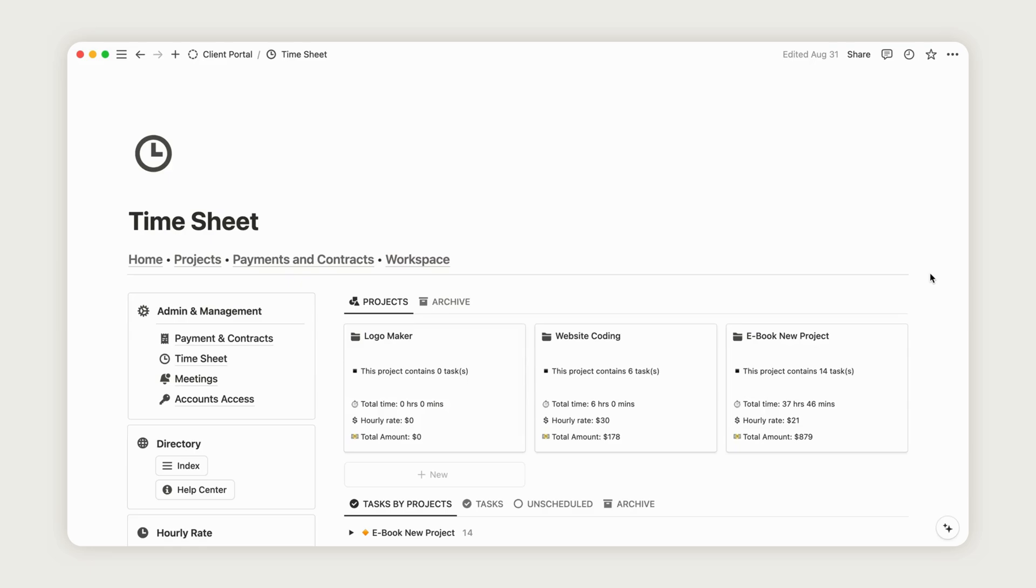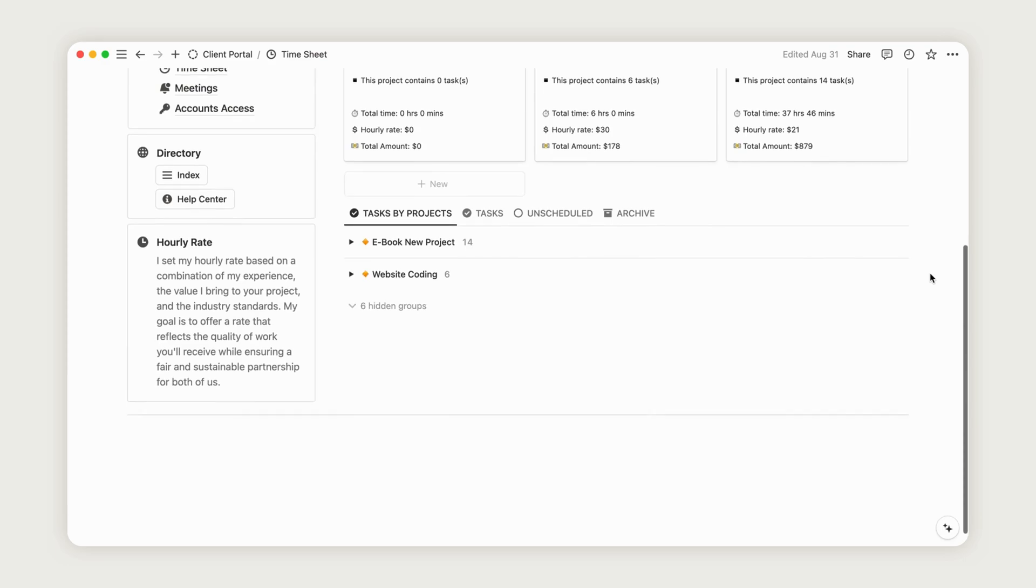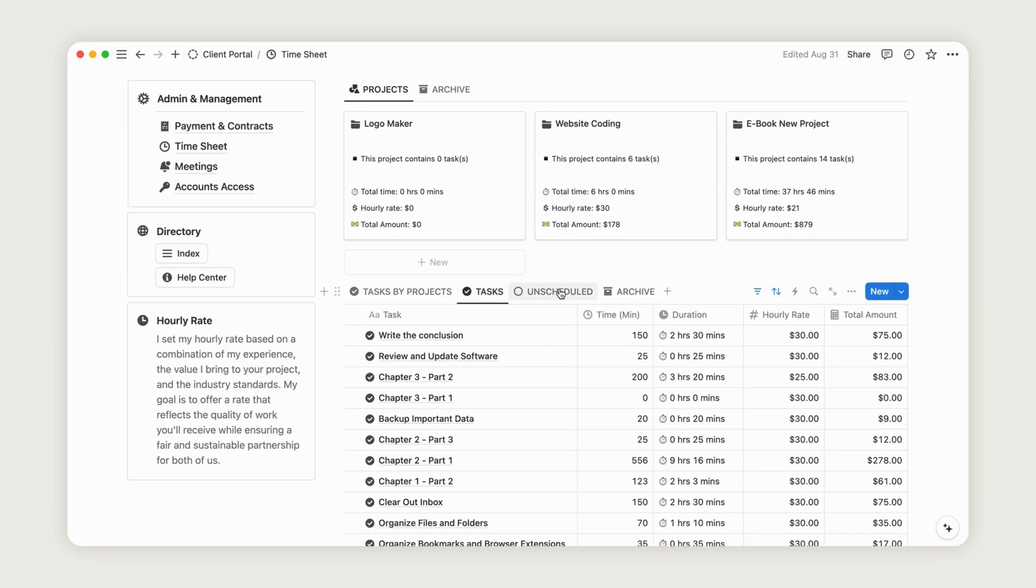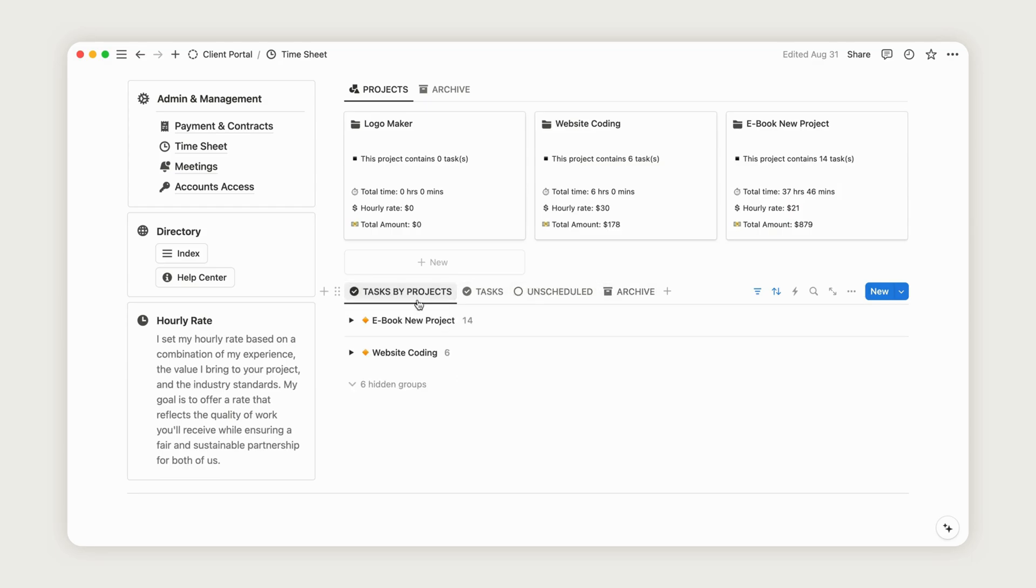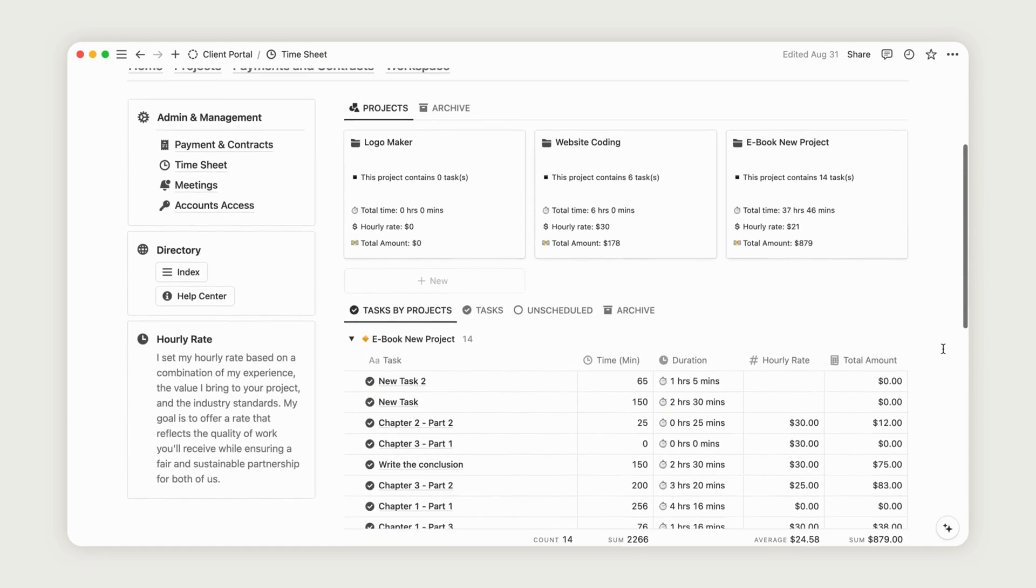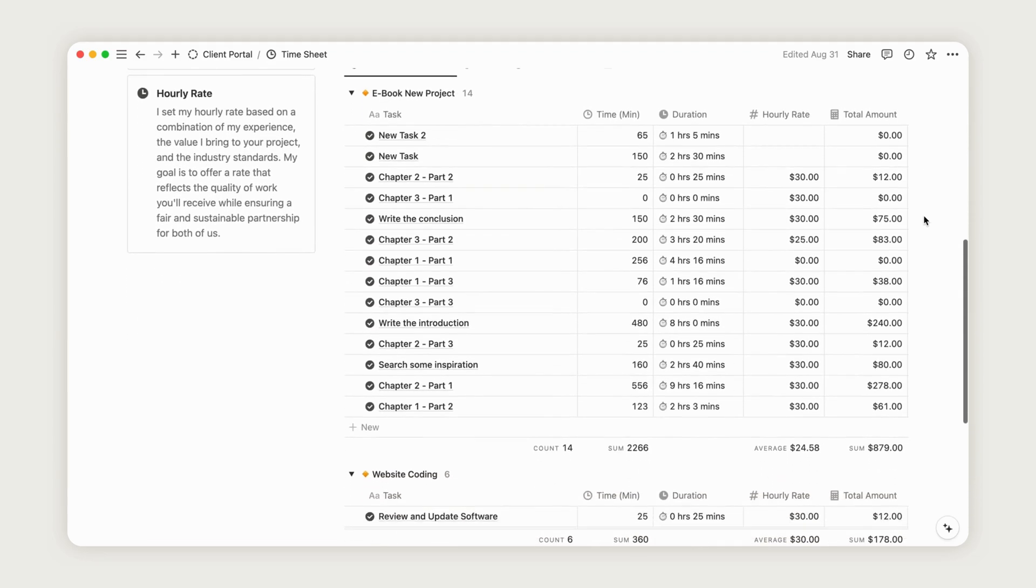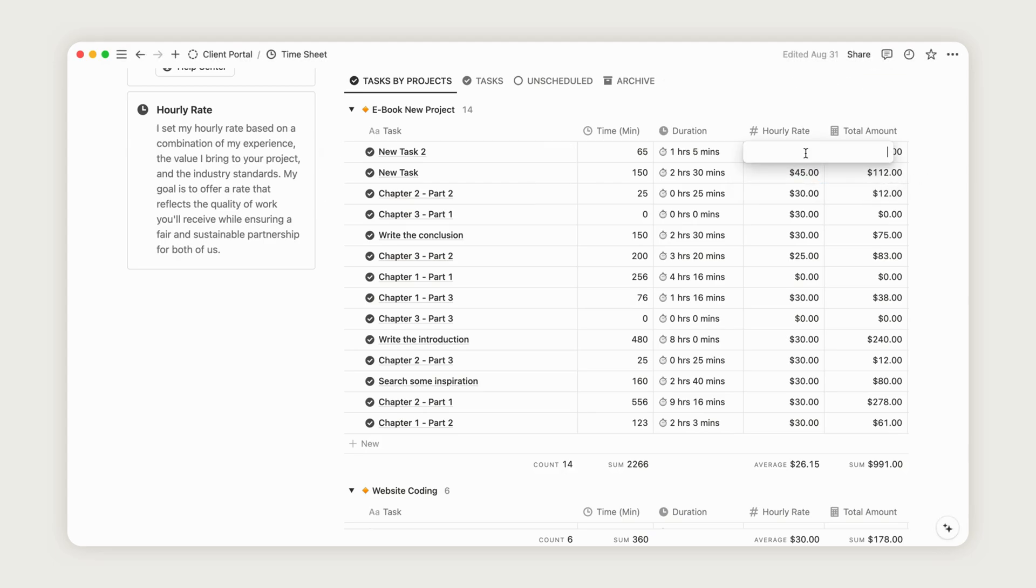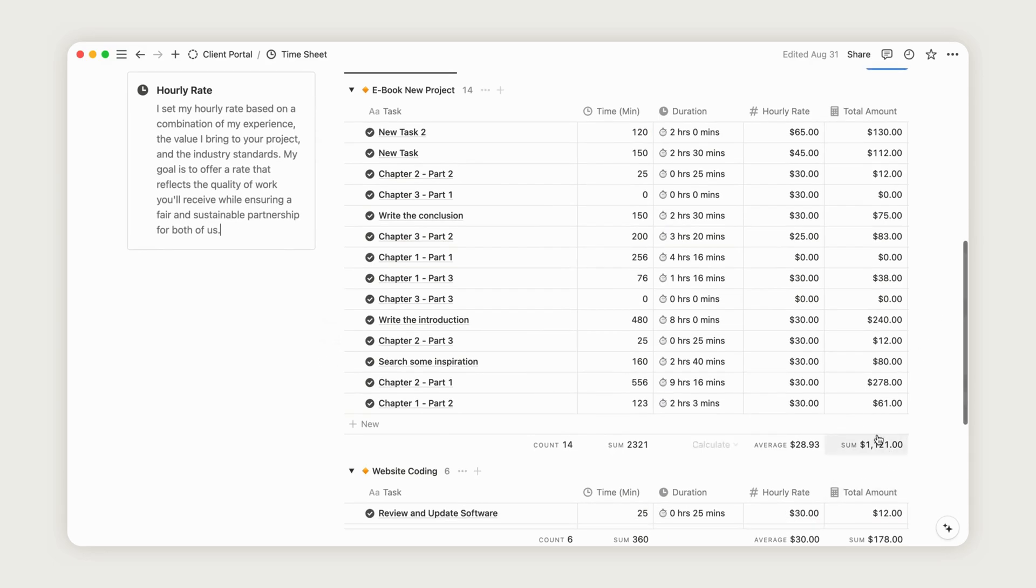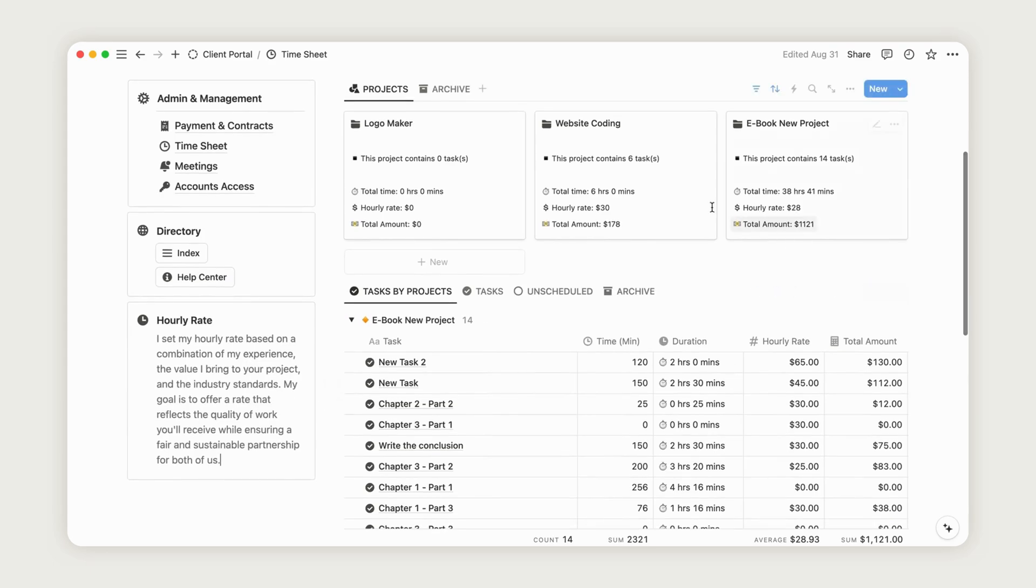The timesheet page allows you to calculate the total amount you should charge your client for each task based on your hourly rate. As mentioned earlier, tracking the time spent on each task within your project management system is essential. This helps you calculate the total hours invested in a project and enables you to create a customized invoice with a detailed timesheet. To get started, set your hourly rate for each task. If the total time hasn't been recorded yet, make sure to update it so that the total amount is calculated automatically. In the project view, you'll find a report at the bottom of each table summarizing the total charge for the entire project. Additionally, a summary report for each project is available at the top of the dashboard.